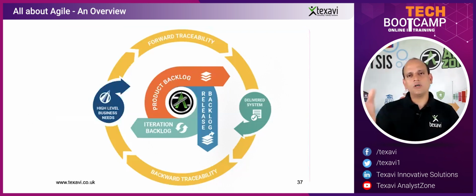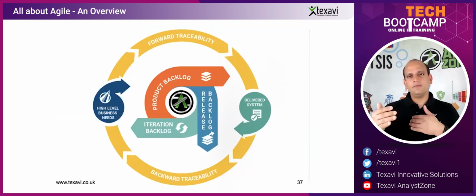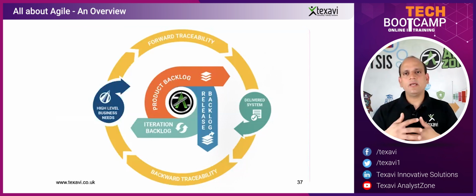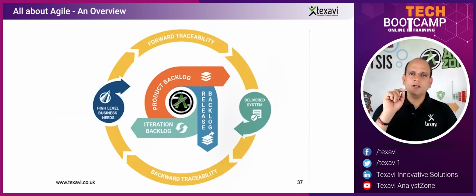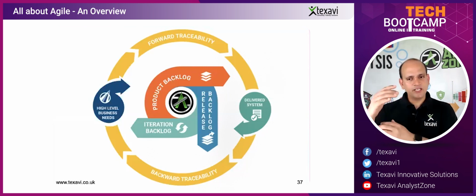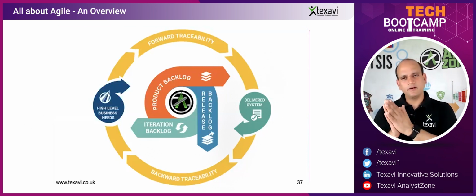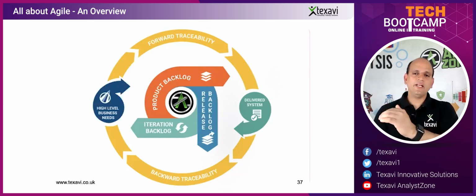And what you do out of that is the release backlog. We are saying that for the next release, by November, we're going to have just the catalog. The release backlog is all about the catalog of items, showing the photos, reviews and descriptions, and maybe selecting the item and adding it to the shopping cart. That's it. All the tasks related to these features, all the features about the catalog, would go into the November release backlog.